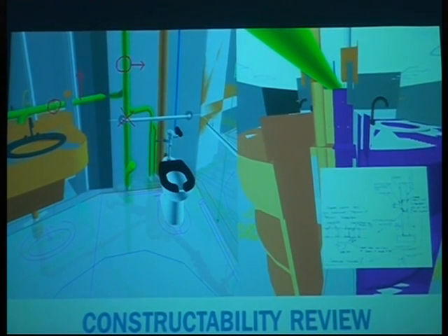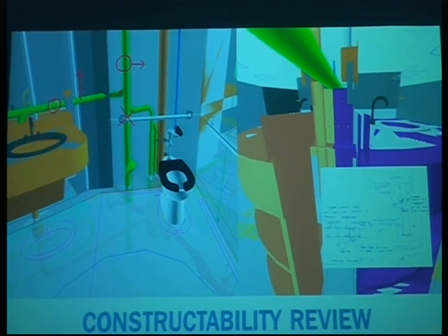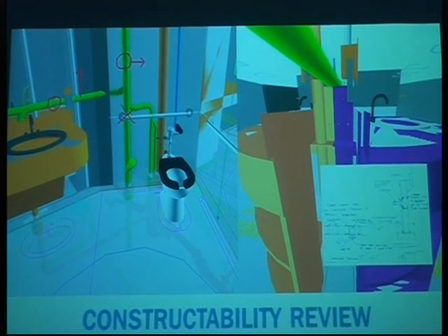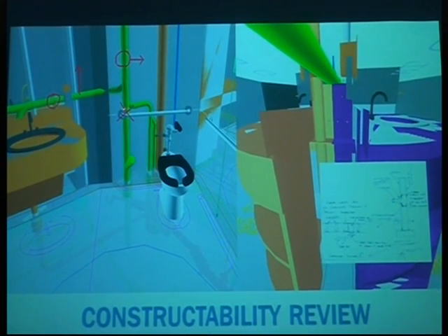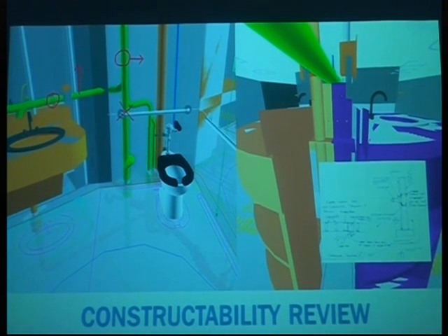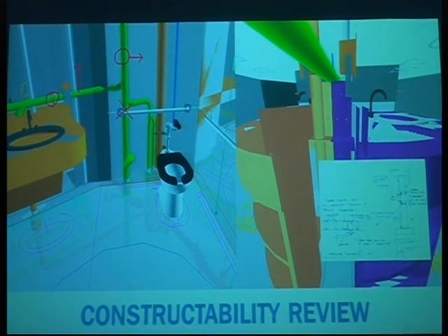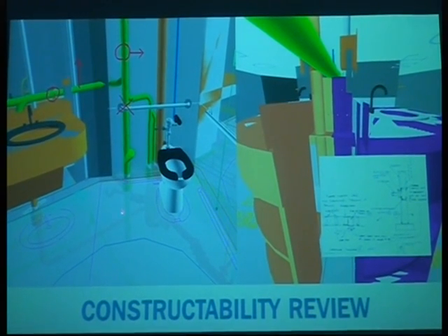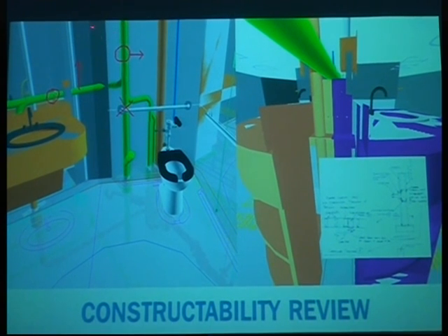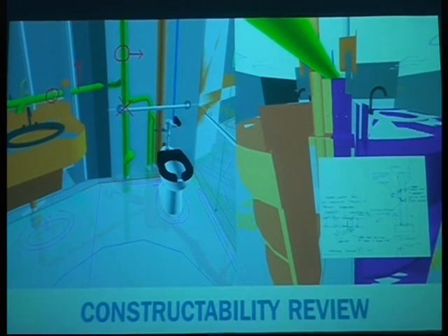And so, again, a construction project is unique by its nature. You don't get to practice. If we had built this wrong, it would have been a lot of dollars. And I'm not sure about here, but in the US, we would have been held responsible for something like this, because a general contractor is held responsible for the design intent. The architect drew this at the right height. The plumbing engineer drew this where it needs to be. It's the general contractor's responsibility to coordinate between the two.